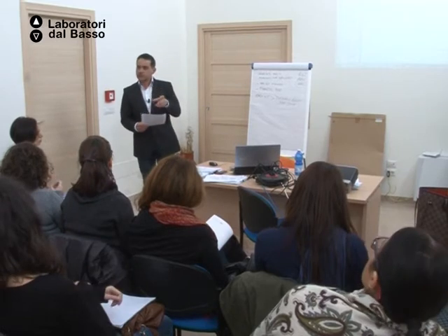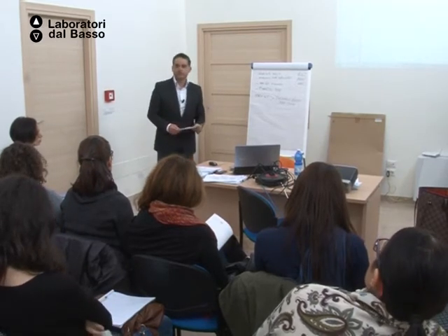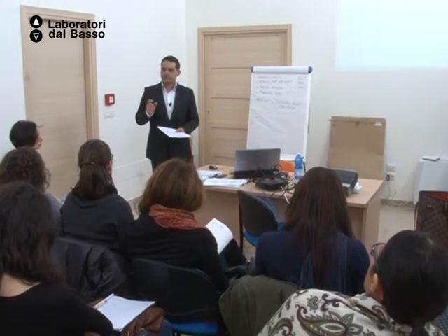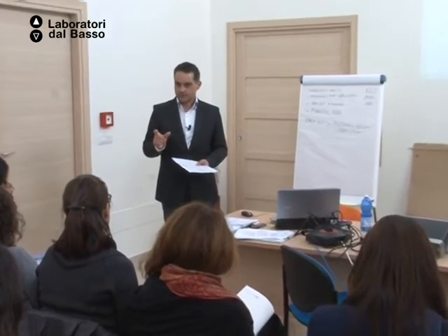Just for you to have a notion right now, you have a maximum grant of €150,000 for a one-year project, which will represent 75% of the total budget cost. All the projects that I've been looking at receive 74.9% or 75%. I didn't find any project in the last 5 years receiving only 60%. So for me, it tells me that if you don't have the right punctuation, you don't even have the possibility to have a grant.